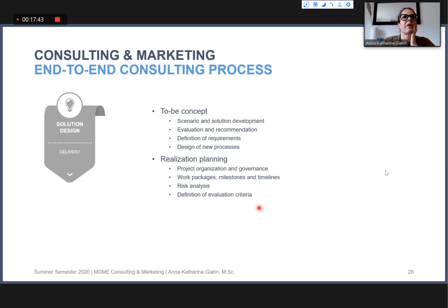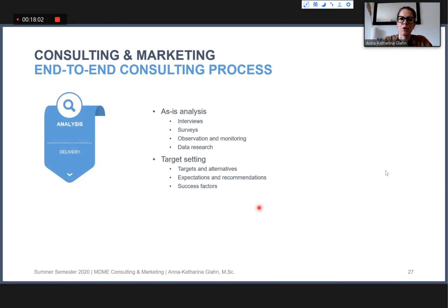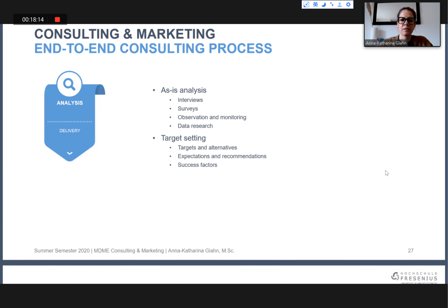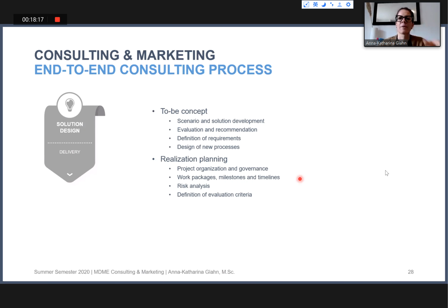For example, taking a look at your project work, the fact that you have to write a project report, do a project presentation, and create a handout would be part of your offer in the first step, in the sales process. And you would say, oh, it would take us like 4 weeks. And on this level here, with the work packages, milestones, and timelines, this is what we created in Trello. So you know at what date a specific work package or task has to be finished.